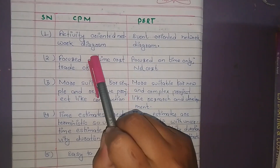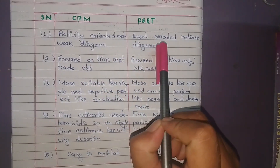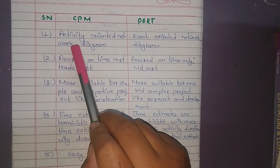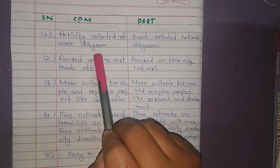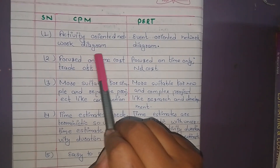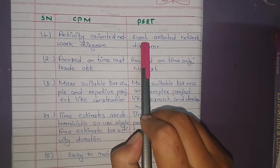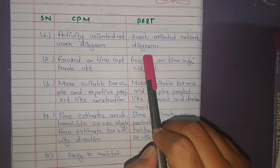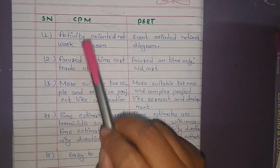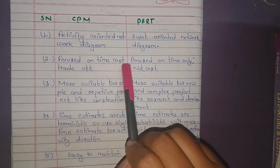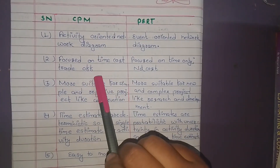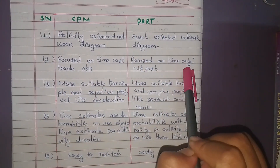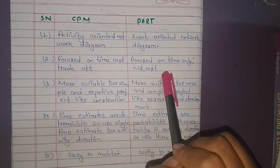The main difference between CPM and PERT is that CPM is an Activity Oriented Network Diagram, whereas PERT is an Event Oriented Network Diagram. CPM is focused on Time-Cost Trade Off, whereas PERT focuses on Time Only, not Cost.